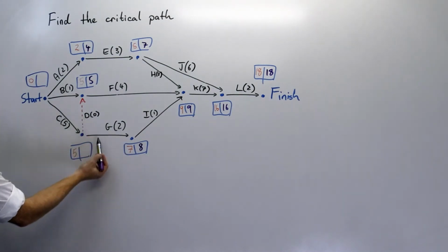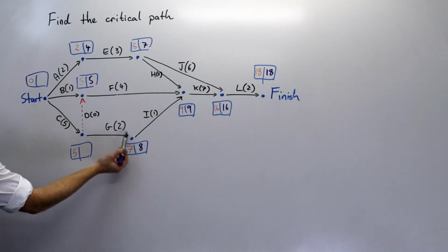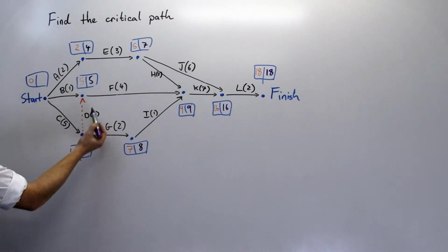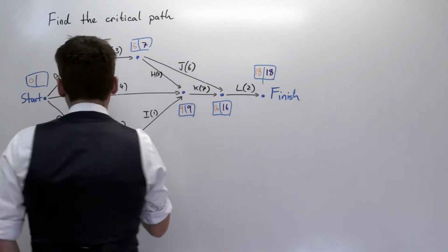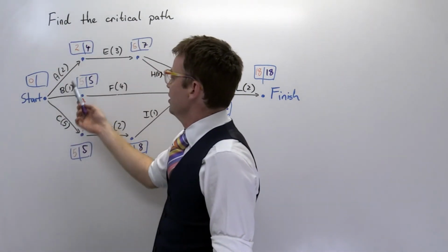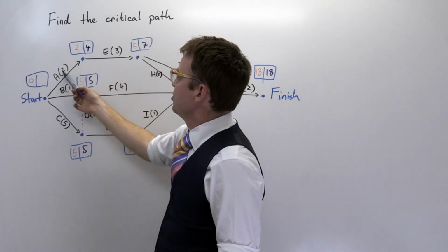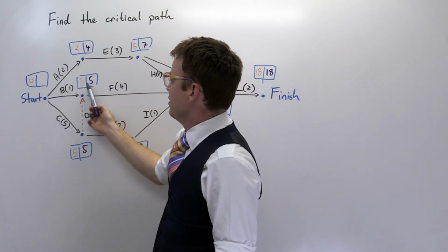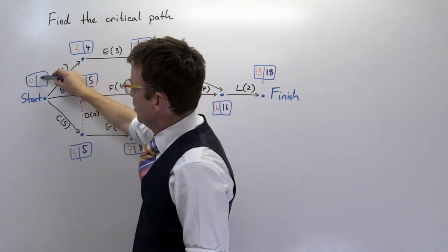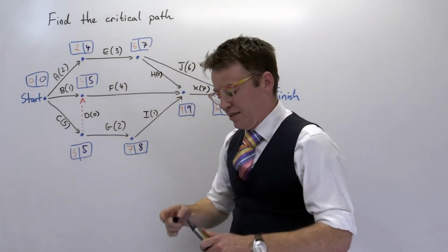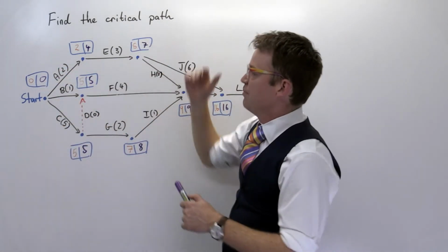This one, there's two things to consider. 8 minus 2 is 6. 5 minus 0 is 5. You take the minimum, 5. And now there's three things to consider. 4 minus 2 or 5 minus 1. So 2, 4 or 0. We get 0. And that makes sense. We were hoping to get a 0 there, and we did. Great.